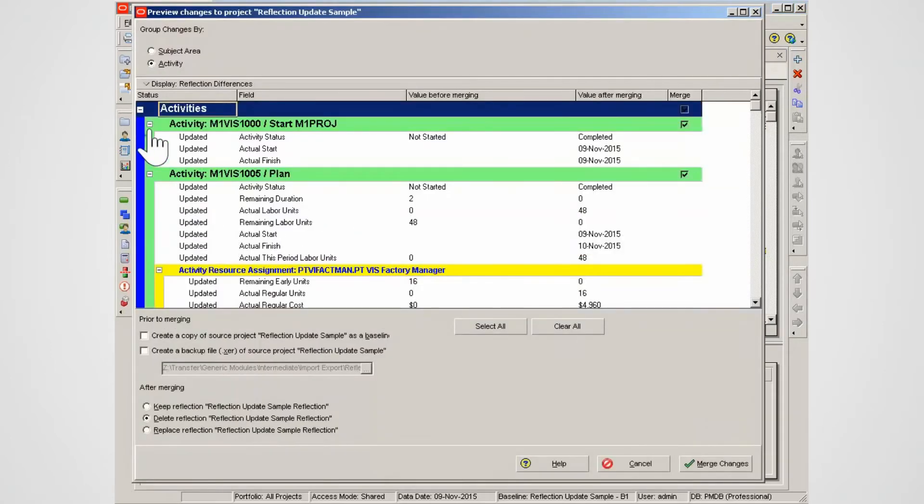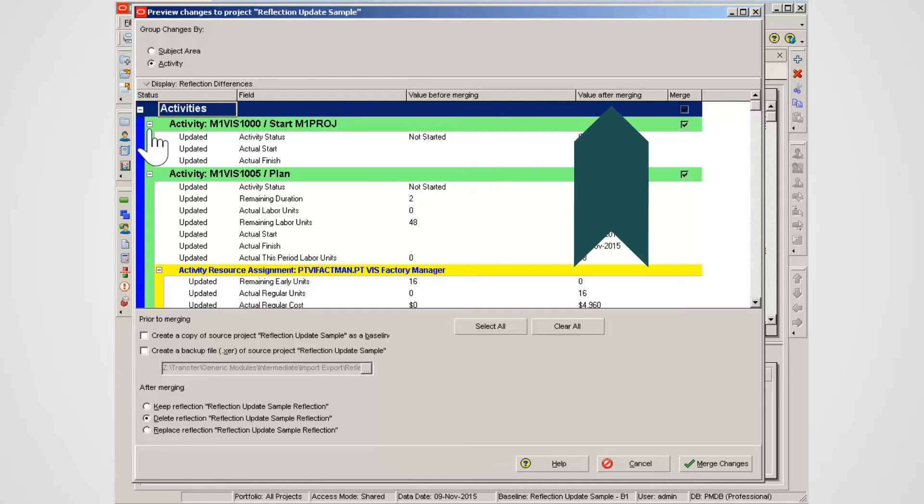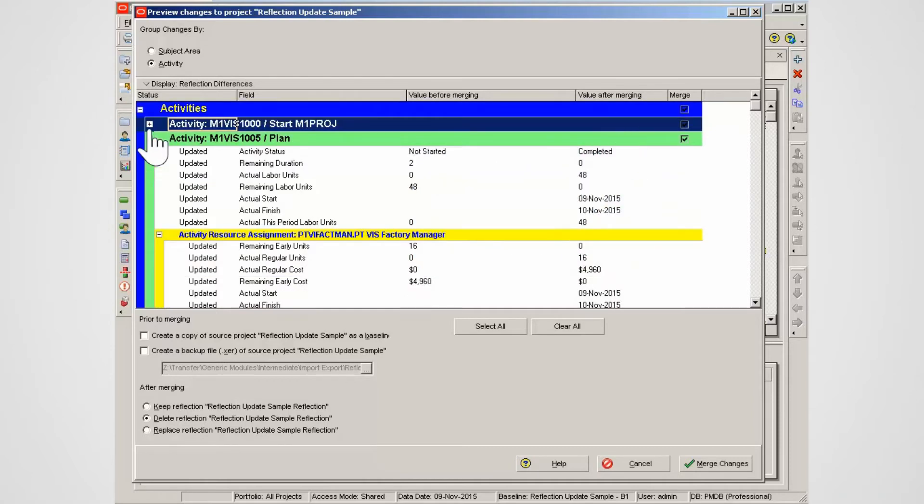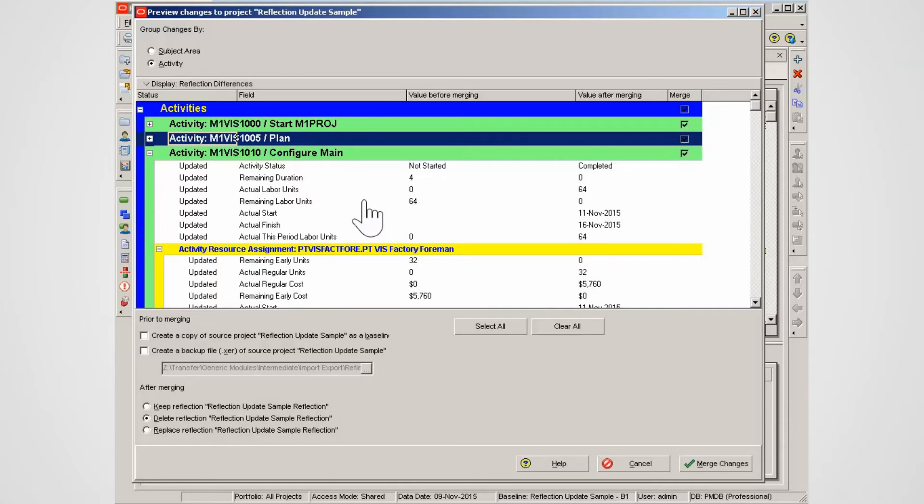Review the changes in the review window. Note the value before and after merging. The user has the option to accept or reject a change by using the checkbox against each change. Note the fields P6 is updating: actual and remaining labour units, start and finish dates.